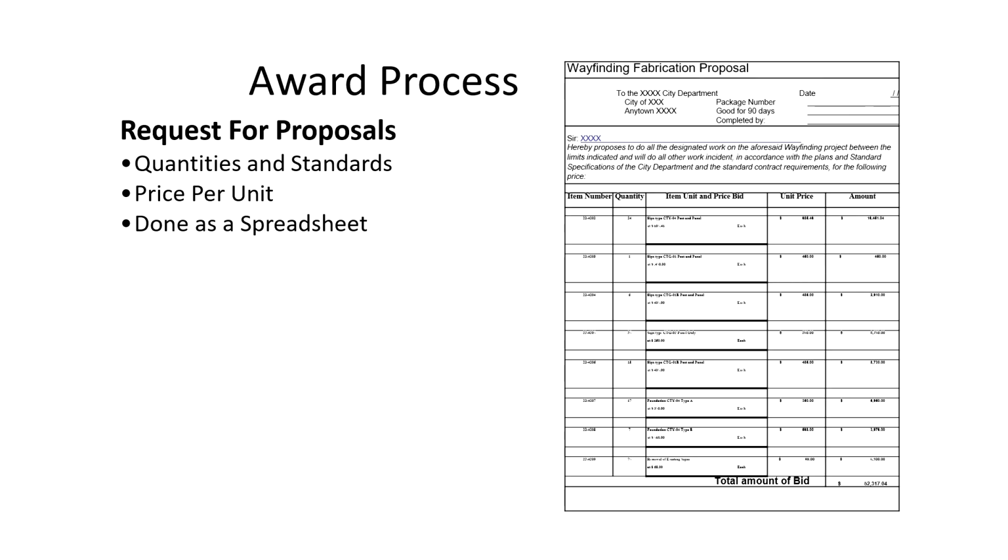This is a formal document used by an organization to solicit bids from potential vendors and contractors for the design, fabrication and installation of signage systems. It has three important things: the quality and standards. In any request for proposal document, the organization specifies the quality of each type of signage needed and a set of instruction standards for their design, material and installation.